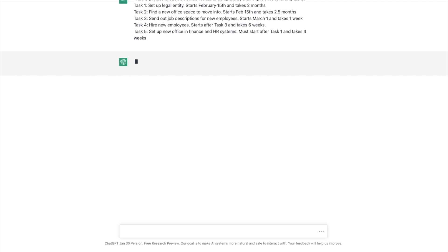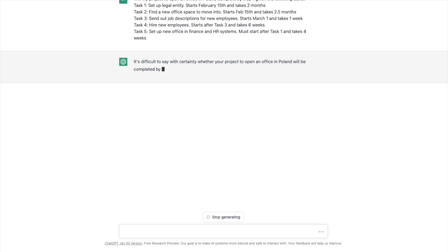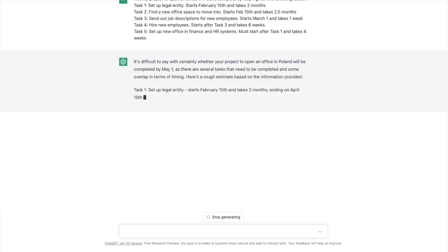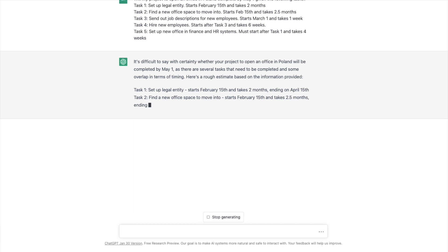Here's the feedback. It's thinking. Let's see what its response is. Probably a lot of traffic right now. I have the free plan and it can be restricted due to traffic. So difficult to say with certainty whether your project to open an office in Poland will be completed by May 1. Task one, set up a legal entity starts the 15th and takes two months ending on April 15th. So it's just kind of regurgitating back the facts though. It gave it an end date. So now it's talking about the office space. So it ends on April 30th. So that is the tightest of them, but I don't have a dependency on that. So we should be okay.